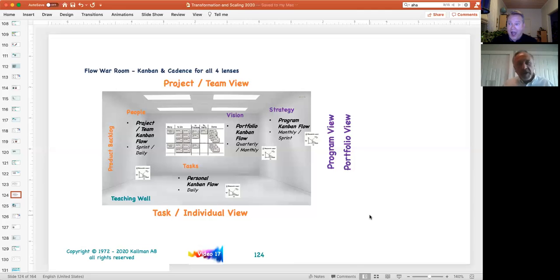Yeah. But that team, by the way, Andrew, we were kind of pricey, if you will, as consultants. But that team we were running was salary-wise about $100,000 a month, and we saved about 21 months. We did 2 years' worth of work in 3 months, saving about 21 months times $100,000 a month. We saved roughly $2.1 million in just OpEx. So in terms of our value, I'm not sure we charged enough.